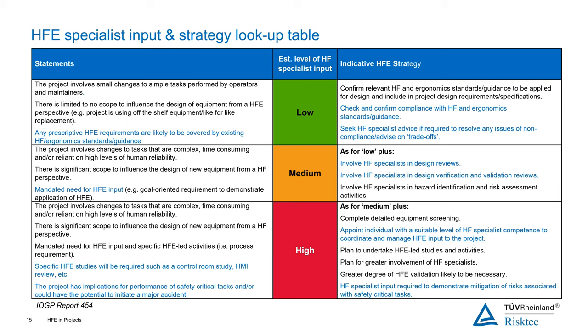So if that's the case, there's nothing particularly new, and the guidance would tell you what you need to do, then your indicative strategy, if you look on the right, may be that all you need to do is check and confirm compliance with specific standards, and maybe seek specialist advice if you need to, should there be any sort of non-compliance issues, so you can actually work out what you need to do about that and the sort of trade-offs. So your level of input for that sort of project, a specialist input, may be low. It may be you only need to bring someone in if you have an issue that you spot.